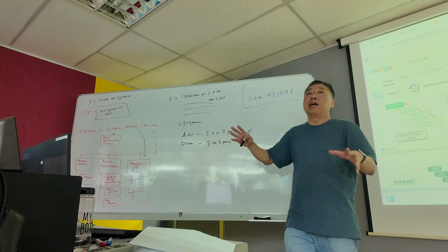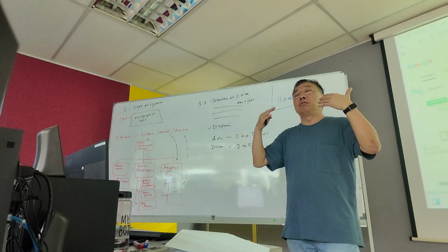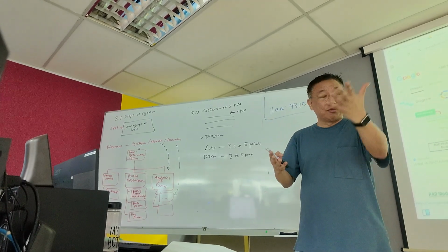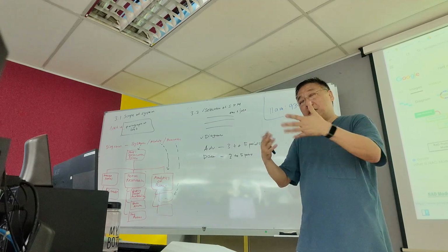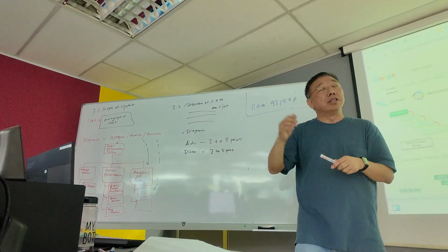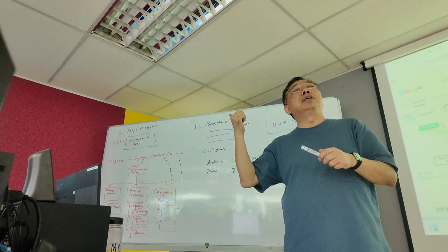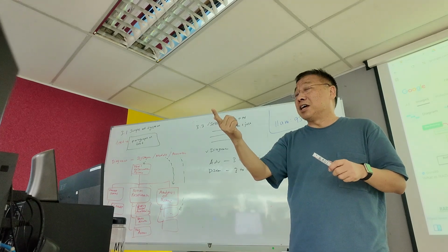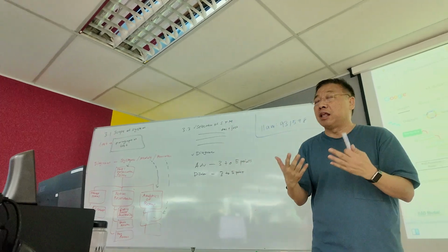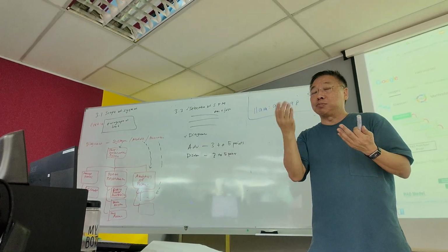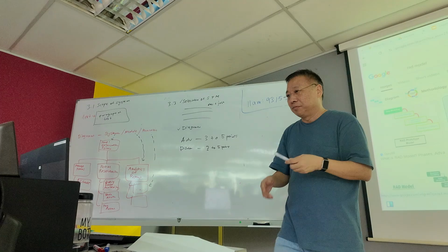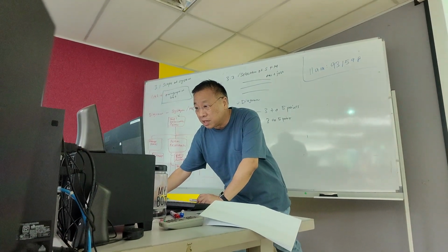I know we are all software engineers, but try to write it by putting yourself in the shoes of your client who is not a software engineer. What are the advantages for him because of this model, and what are the disadvantages? For example, a disadvantage if you select RAD is that it will need high user involvement. It will need the client to understand and have his business requirements very well defined. So when the client sees that, he will come prepared and say, oh, if I cannot specify my business requirements clearly, I need to prepare myself because this process model requires that. So that's why you should write advantages and disadvantages.